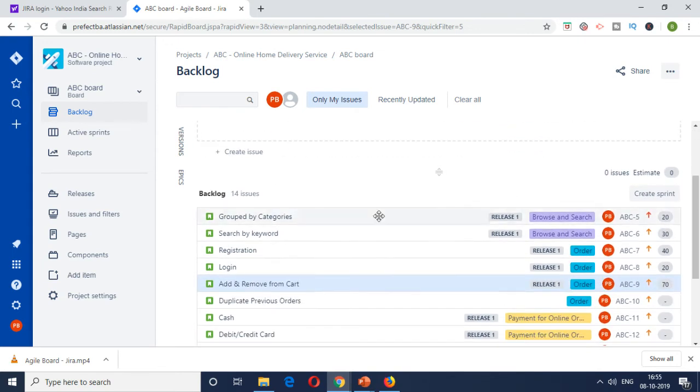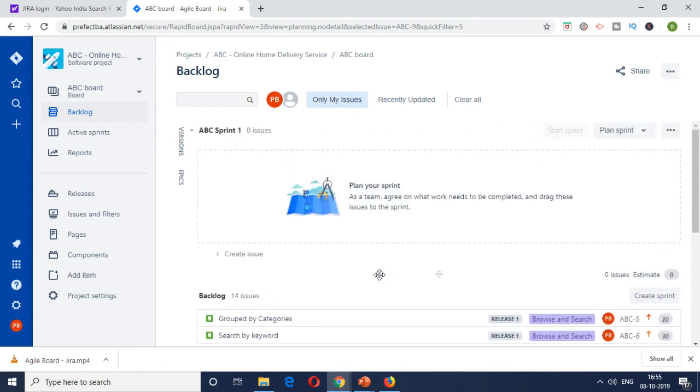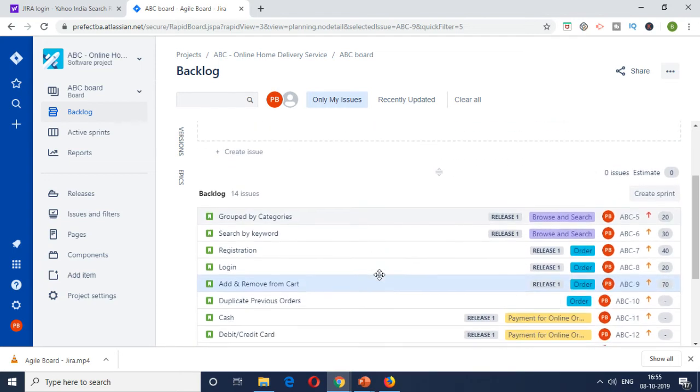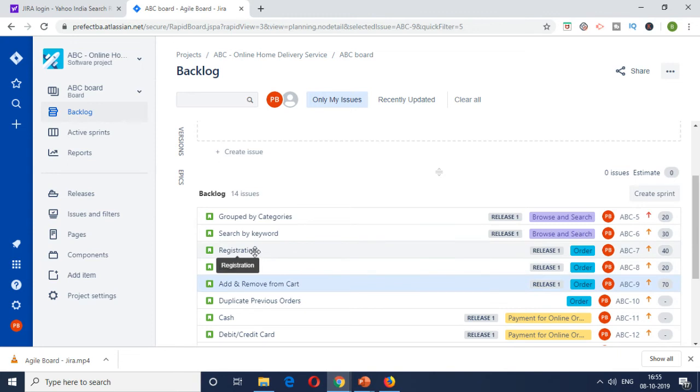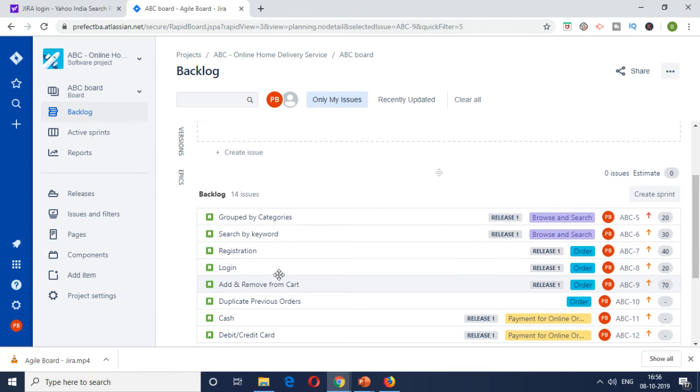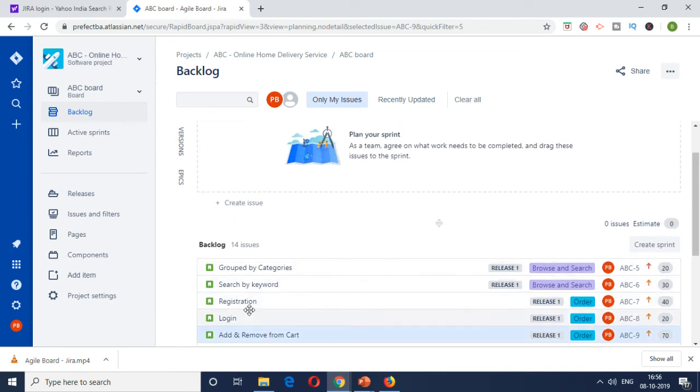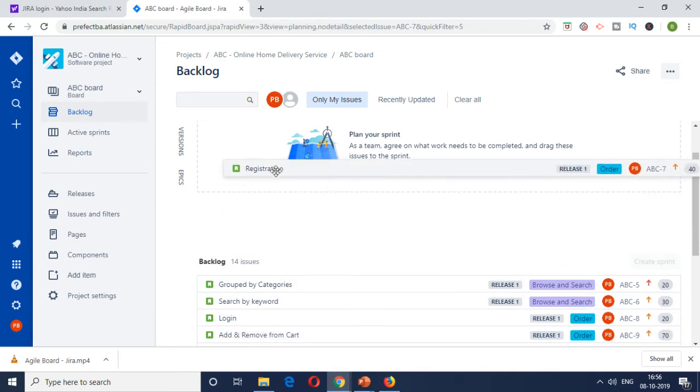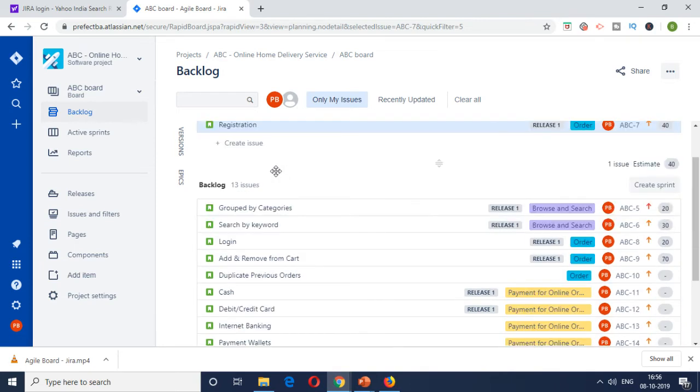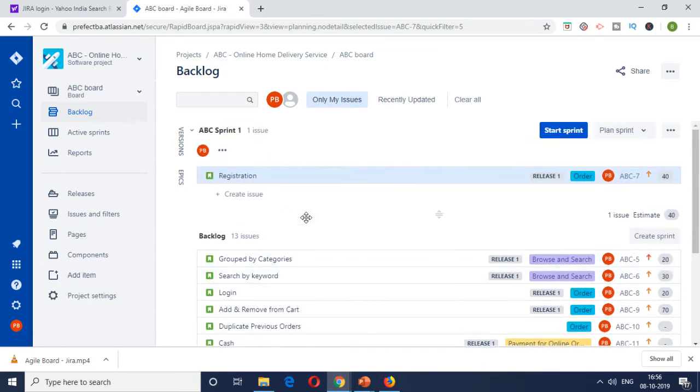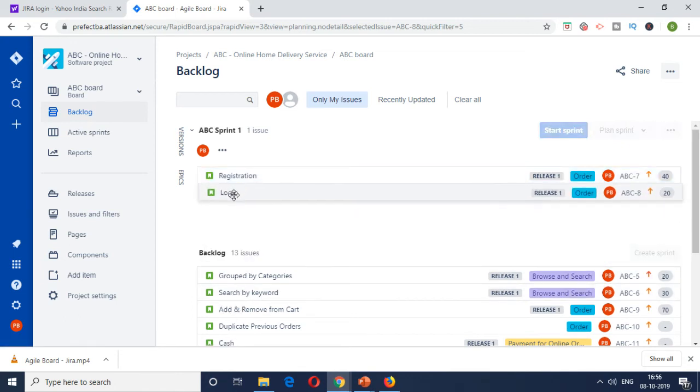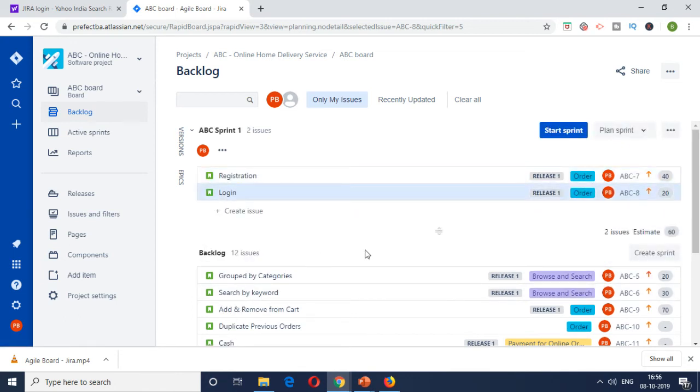The team can look at things and then they can see which can be done in sprint one. Again, there will be a dependency. For example, registration feature should be available before the login can work. So that dependency should also be discussed and considered while taking items into a sprint. So let's say, let's go with first one registration. So it's a 40 story point. So this is one thing we definitely required. Then the login feature 60 story points.